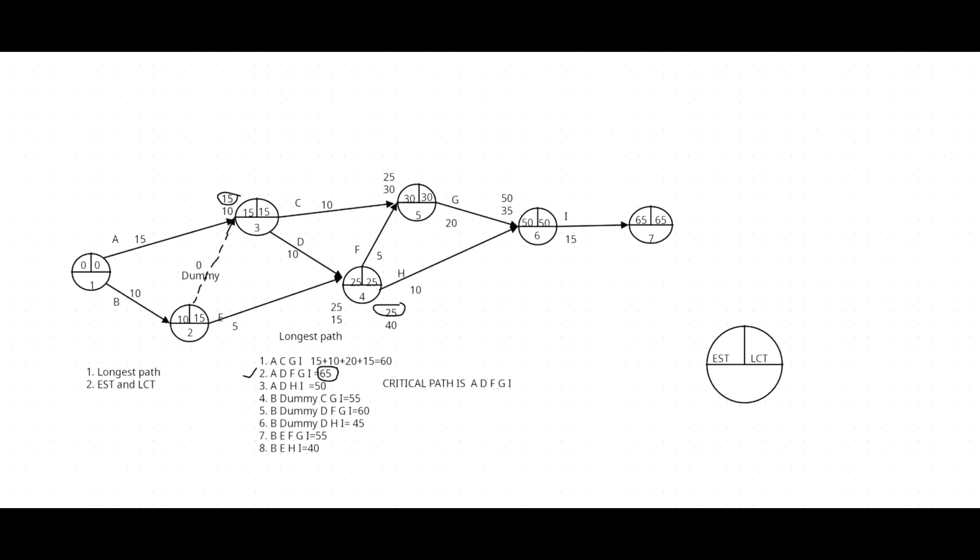Now we can find the critical path. Remember, normally on the critical path, the earliest starting time equals the latest completion time via that event.